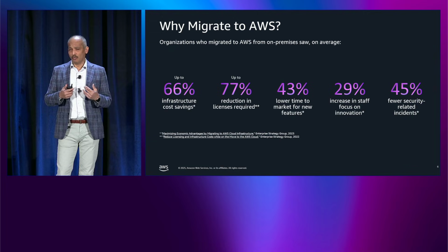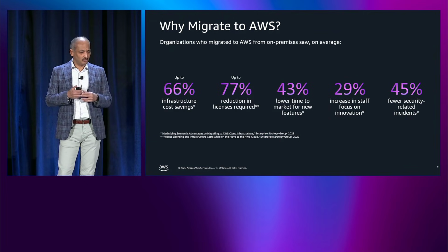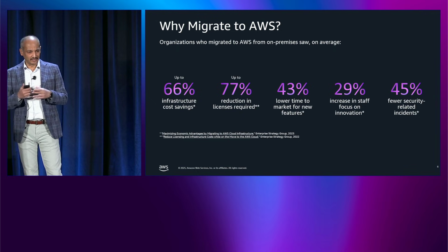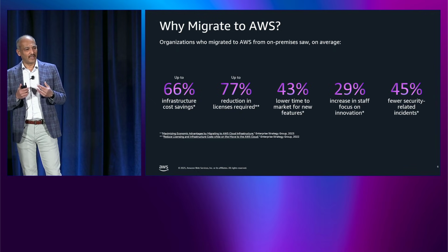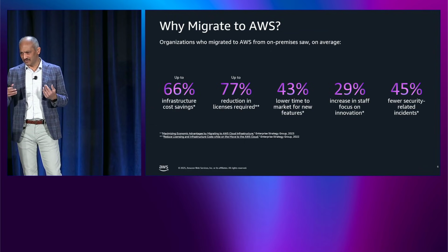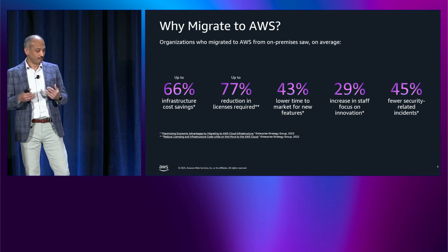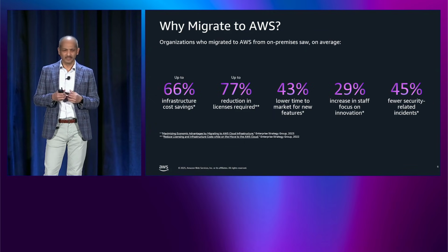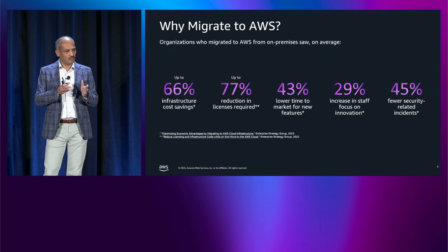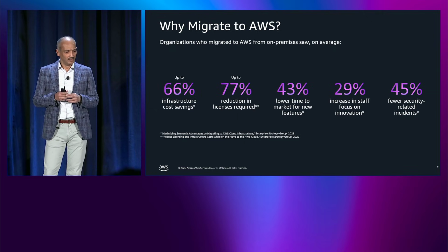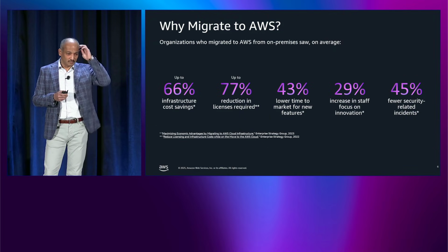And once you know why you want to migrate, it's important to also know, most of the whys can be tied to some kind of a metric. So you want to be able to define metrics that can tell you how successful you are being at migration. Migrations can take a long time. Priorities can change. It can take months sometimes, hopefully with agentic AI, weeks. But even so, as the migration is proceeding, you want to make sure you have metrics that tell you whether or not you're on the right path, you're being successful or not. So these metrics are going to be important.